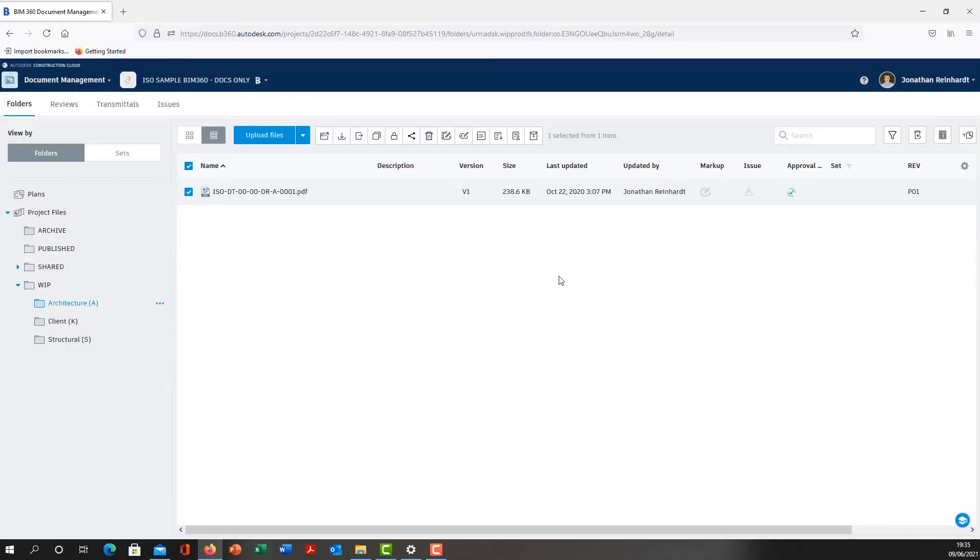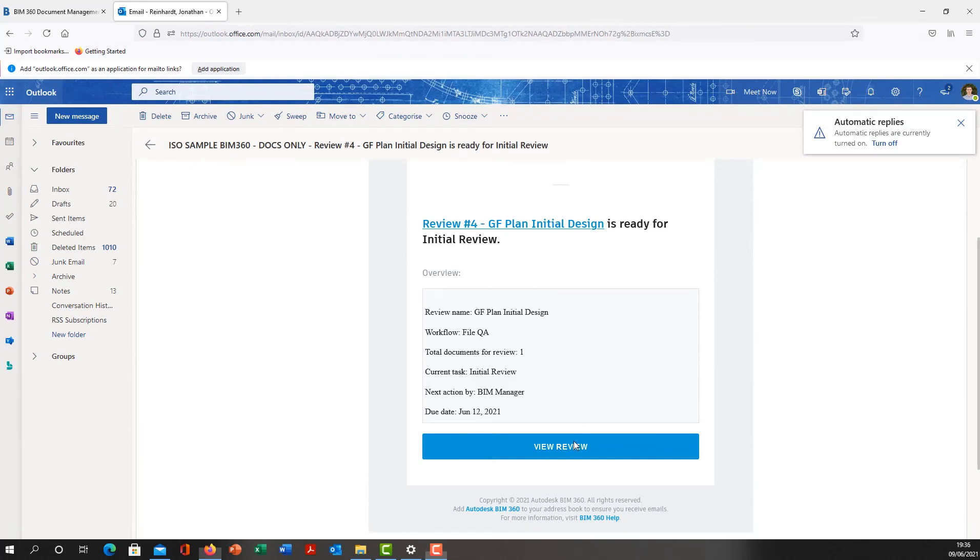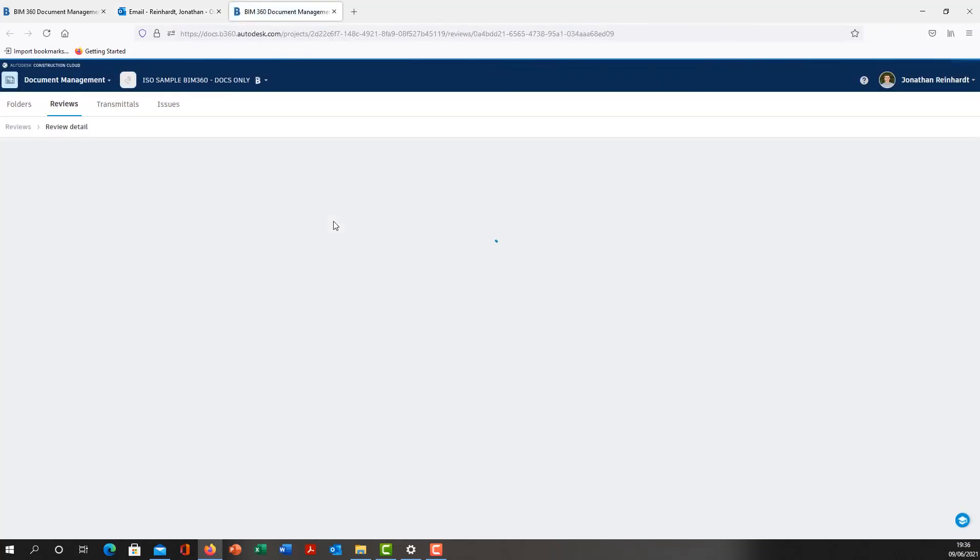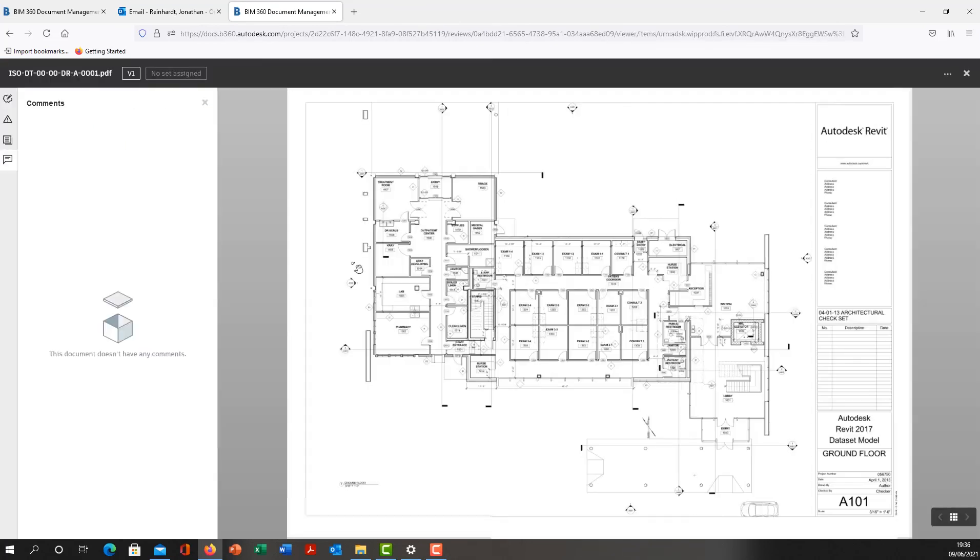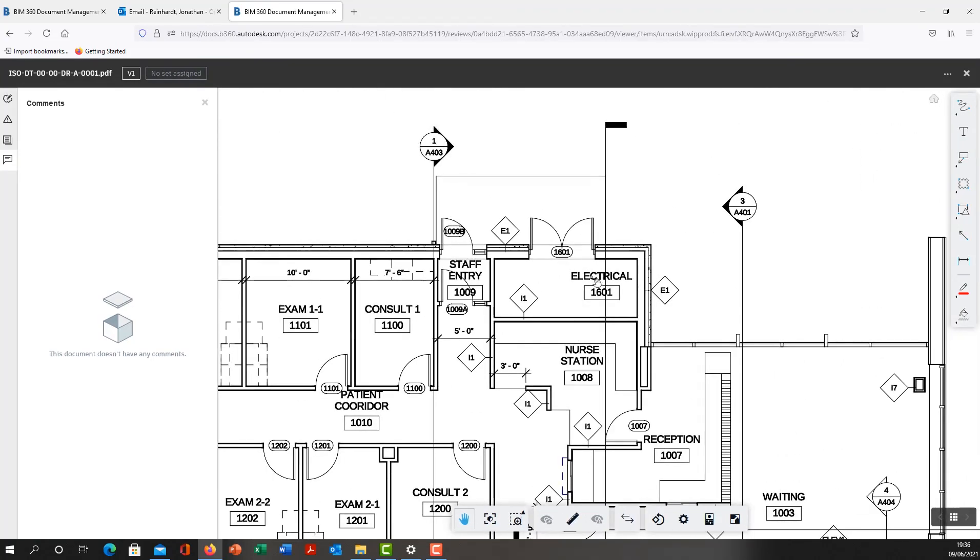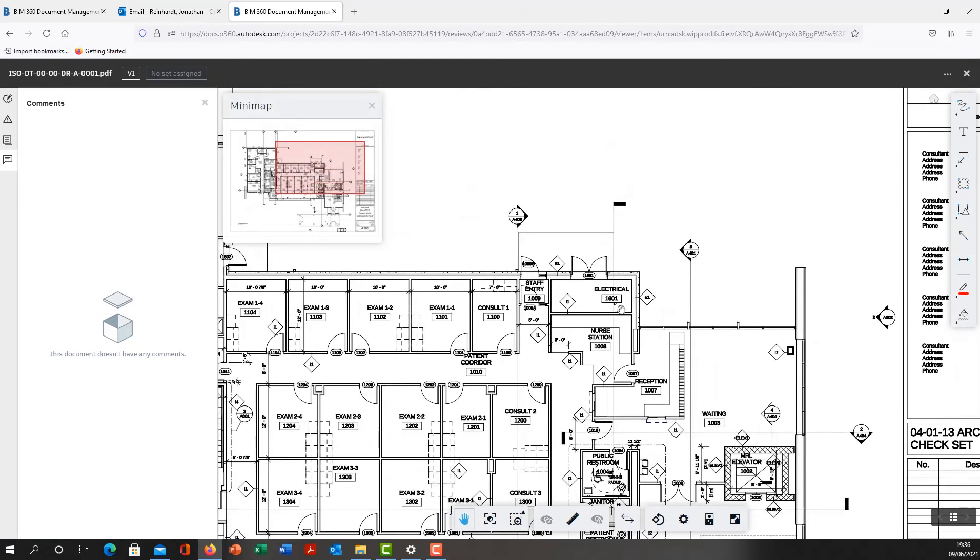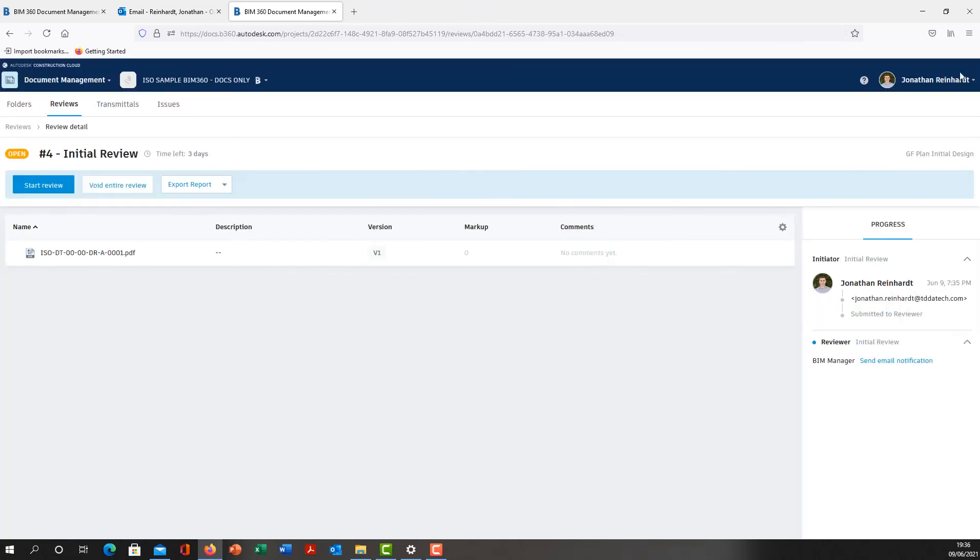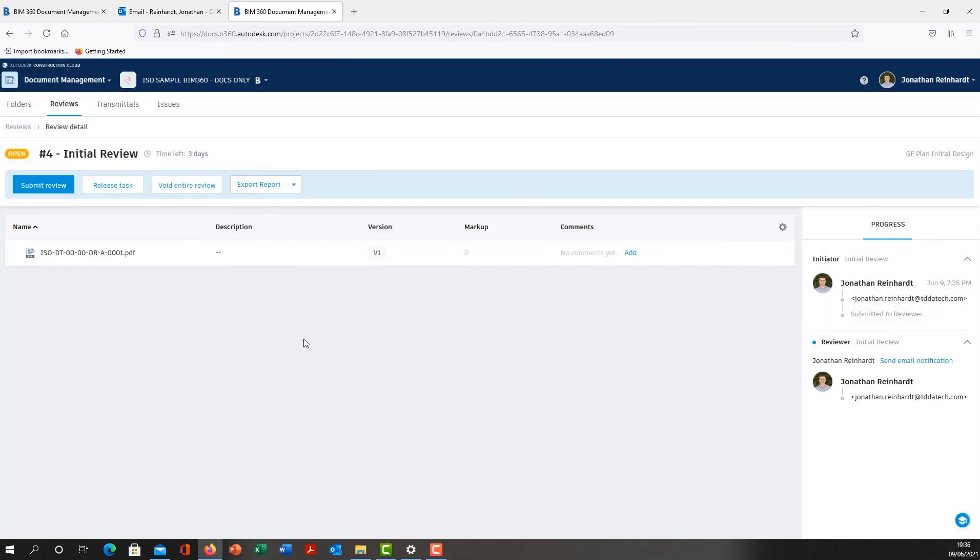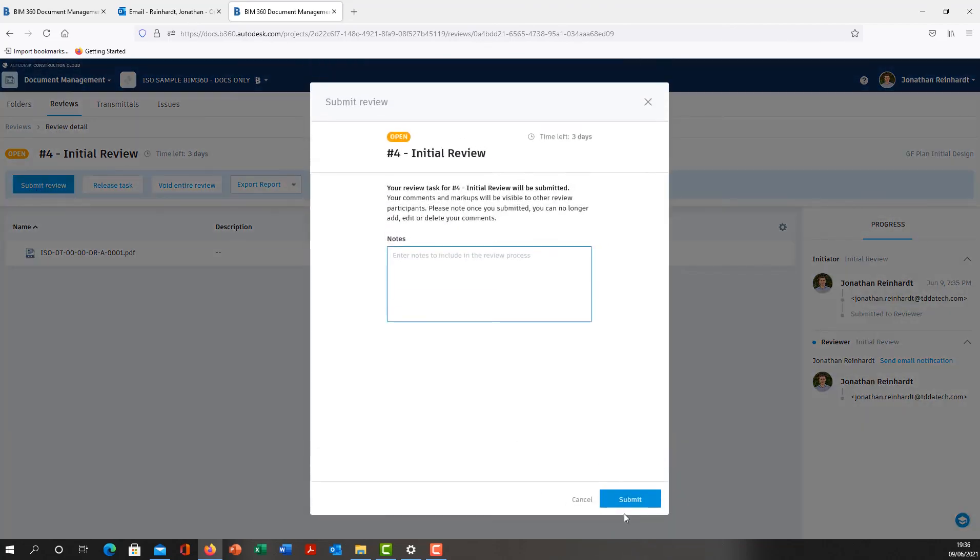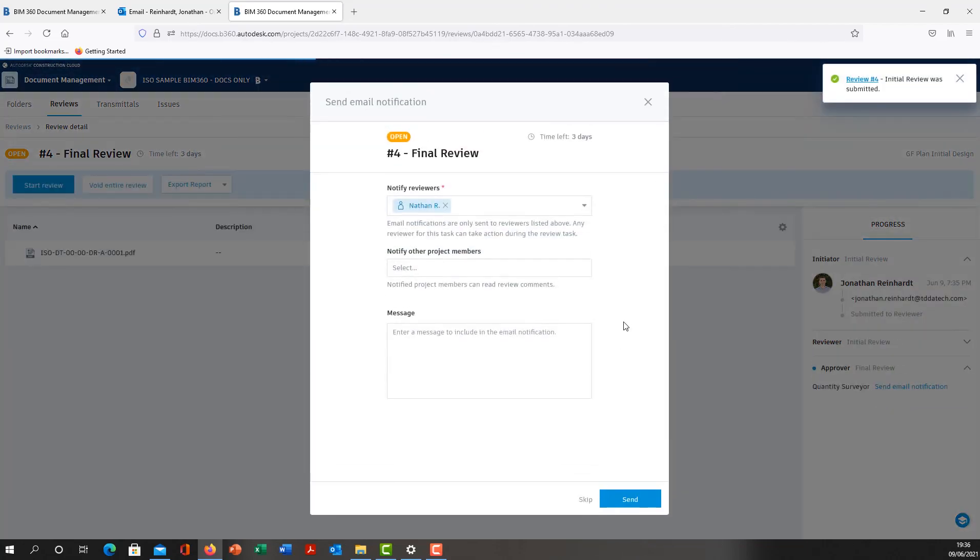They will now receive an email. I have now received an email as the BIM Manager to review this particular project. Hit View Review. That's going to bring me into my BIM 360 document management and show me this particular review. As the BIM Manager, I can now look at this drawing, review it, make sure I'm happy with it, check everything is in order. I can also log issues if I want and assign it to somebody, and they will receive an email also. Just for ease, I'm just going to X out of this. I'm happy with the drawing, I'm going to start a review, I'm happy with what I saw, submit review, and now it's going to move to the next person.